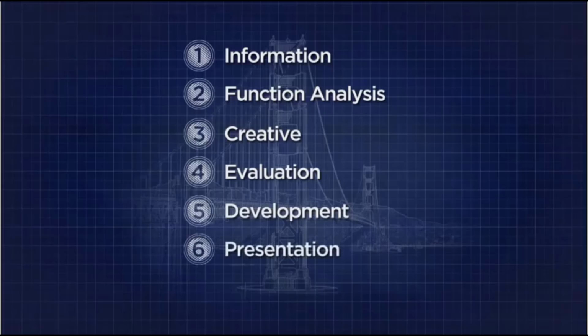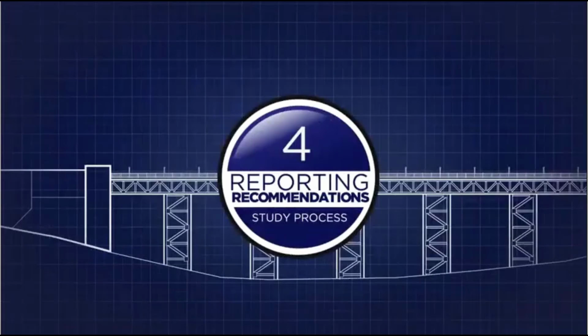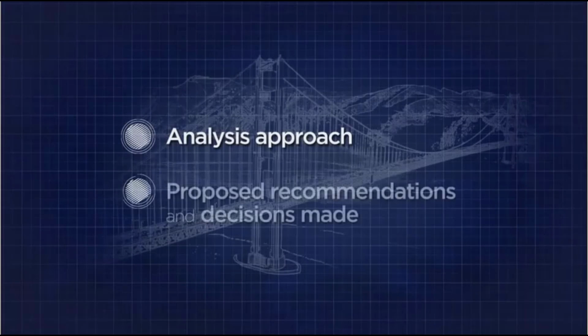The presentation phase presents the value engineering recommendations to the project stakeholders. And the resolution phase is when these recommendations are evaluated, approved, or denied. These decisions are documented, and all approved recommendations are then implemented. The value engineering study culminates with a formal written report documenting the analysis approach following the value engineering job plan, the proposed recommendations, and decisions made.